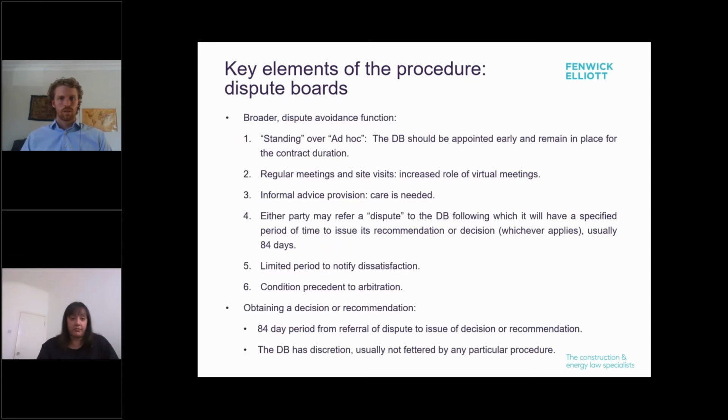Robbie? As regards dispute boards, in the last few years, the major dispute institutions have released new sets of rules that provide for a broader role for the dispute board focused on claims management and dispute avoidance. Although the powers vary widely, each of the new sets of rules share the following key elements. Firstly, all of the main institutions now call for standing dispute boards wherever possible. In practice, ad hoc dispute boards are still used extensively, for instance, in the 1999 FIDIC Yellow and Silver books, and will continue to be appropriate for smaller projects.